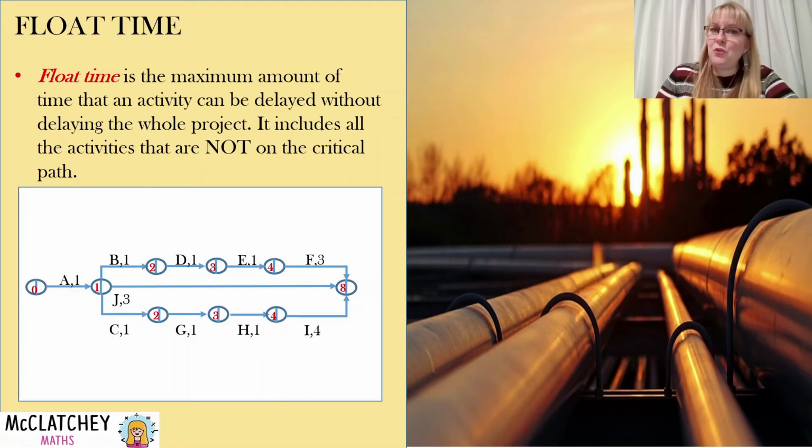We've also got this new concept now, a new term called float time. This is the maximum amount of time that you can hold off completing an activity and it won't throw the whole project out. So the only activities in a network that have float time are the ones that are not on the critical path. Because obviously, if I took longer to reply to my emails, the whole process is now suddenly longer than 8 minutes.